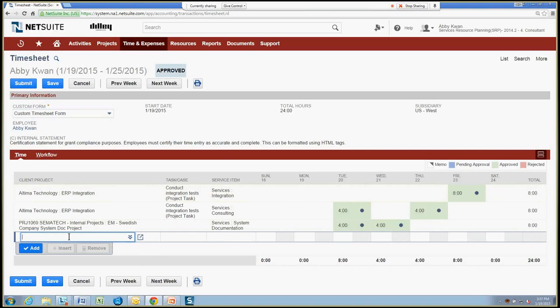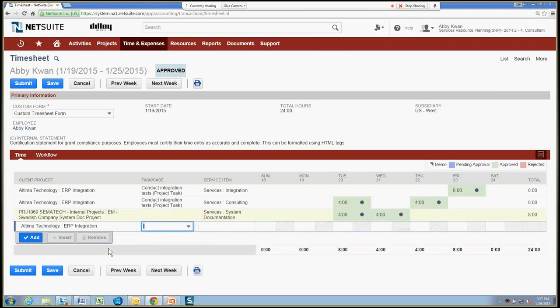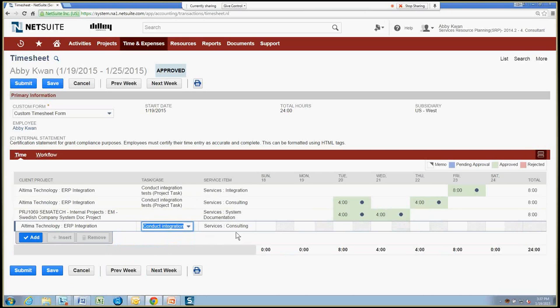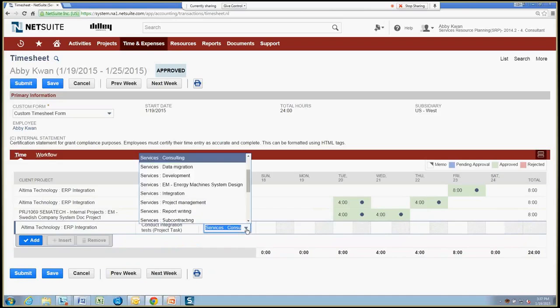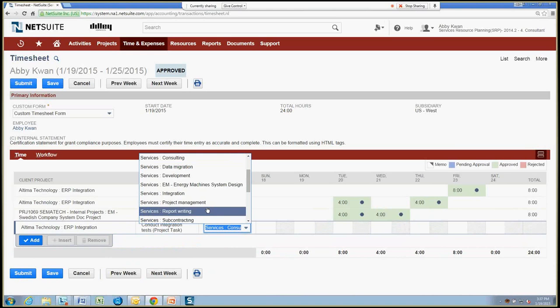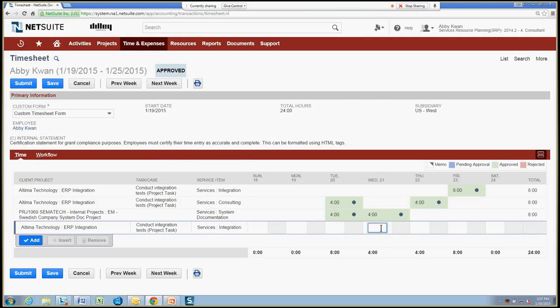So for this case, we're going to add a little more time to our ERP integration project. And it will be the integration testing project task. And the service item is designed to determine the billing rate for this time to the customer. So we're going to actually override this. This was assigned by the task. We're going to say this is an integration billing rate. And on Wednesday the 21st, we'll put in an additional four hours that we worked on that.